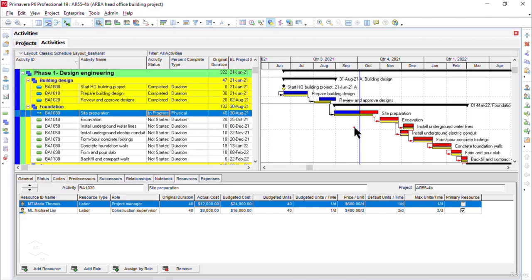Of course, you can select and have your own status update as per your own project requirements. But in this case, I'll be doing my status update every 2 weeks. So remember, our previous update was on 4th of October, and since we'll be doing our status update every 2 weeks from now, our next status update will be on 18th of October.